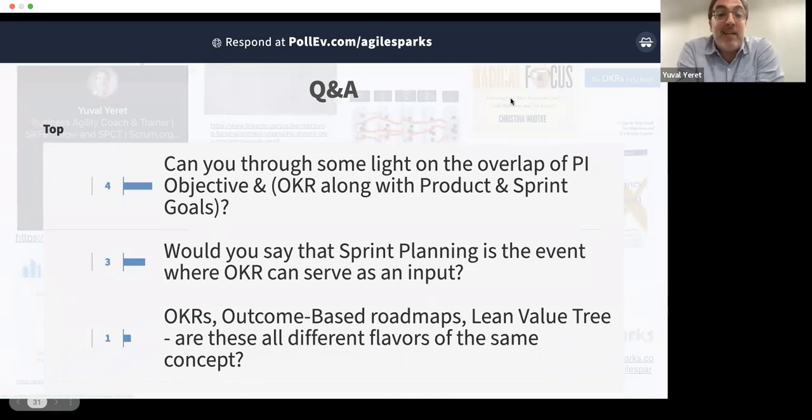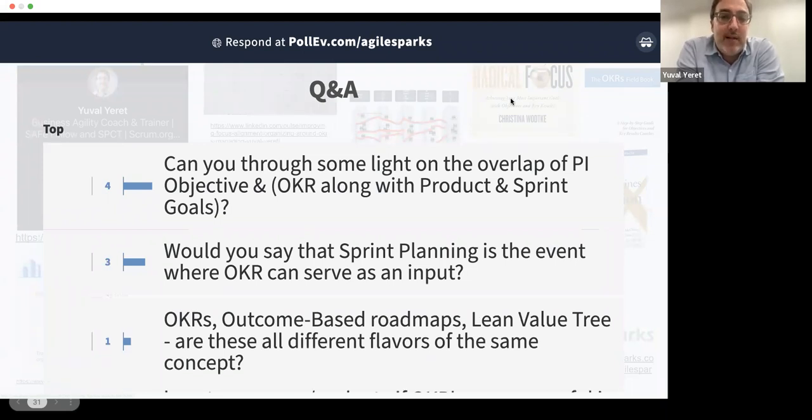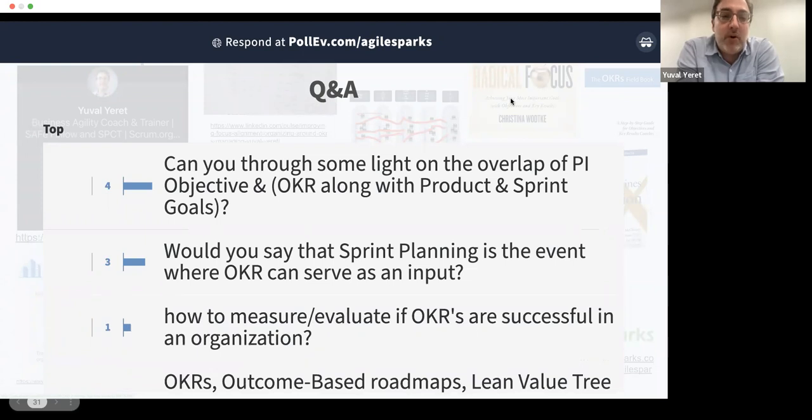One important thing we do when planning that program increment in an activity called PI planning is, rather than focusing on exactly what the output or work is, the stories that the teams are committing to in each of their sprints, they do some simulation of what they'll be able to work on, and they craft PI objectives.